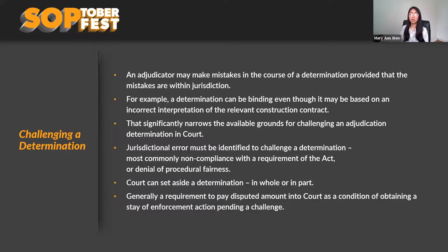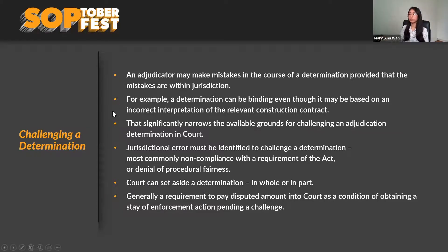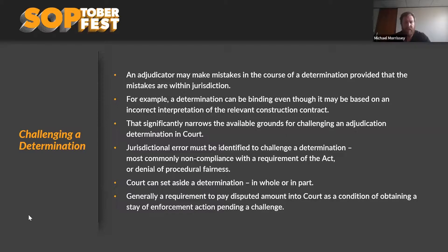The most common grounds for challenge are non-compliance with requirements of the Act or denial of procedural fairness — for example, not a valid payment claim, not a valid payment schedule, or issues around service. The court can set aside a determination in whole or in part, but generally there's a requirement to pay the disputed amount into court as a condition of obtaining a stay of enforcement action. Challenging a determination through court is not a cheap process, and you'd also have to pay the disputed amount as a condition.